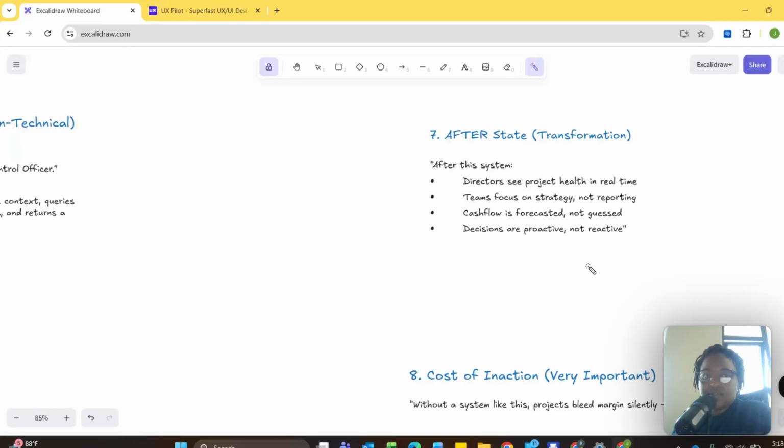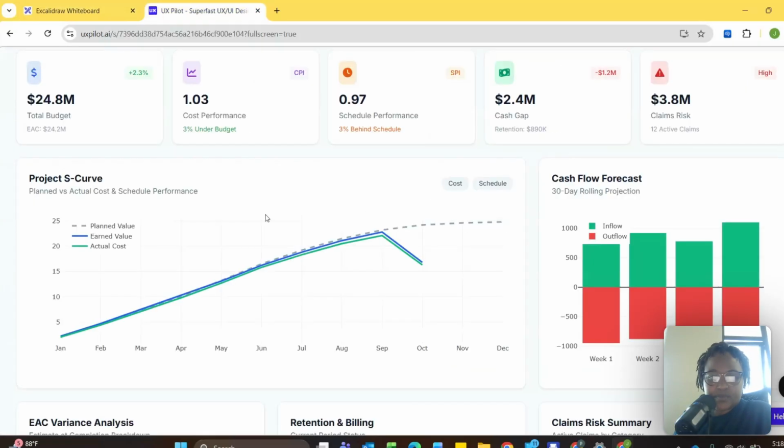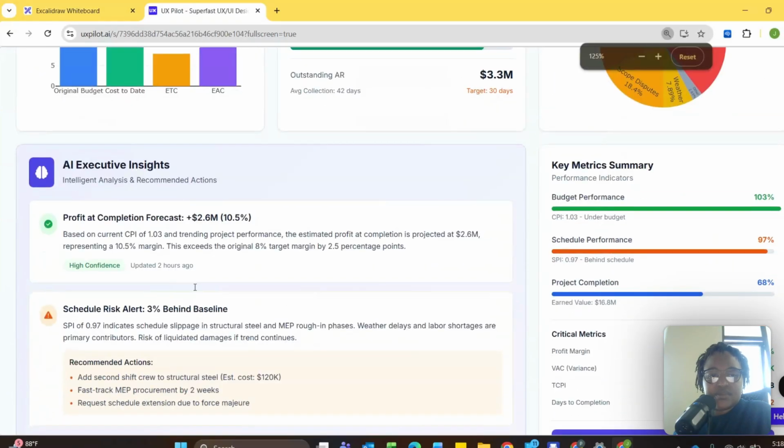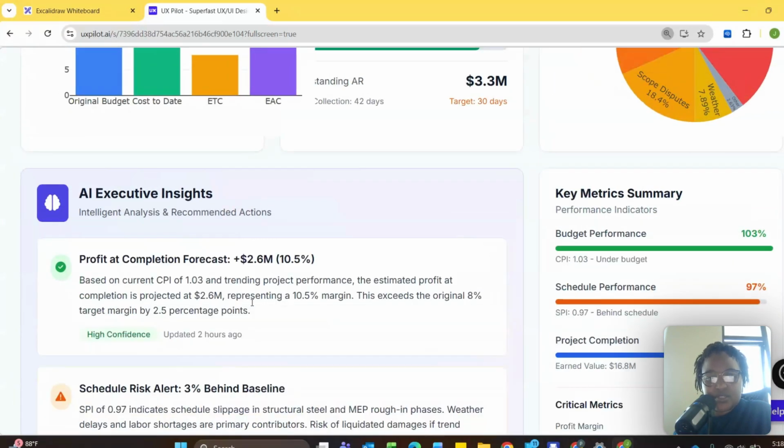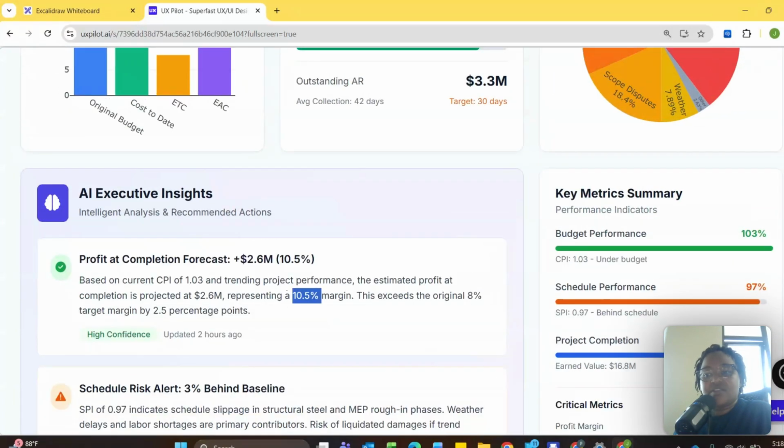we have seen in our dashboard that previously the cost margin planned was 10.5%. And currently our project has 68% completion, with the cash flow used, with the expenses used, we are left with an 8% potential target. So the target has reduced by 2.5.